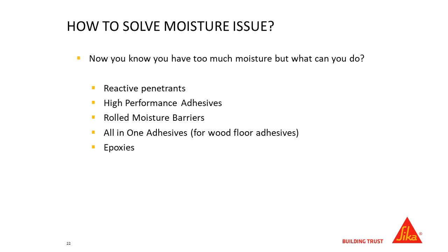Well, typically, if it's early on in the schedule, you're not due in for a number of weeks, the general contractor may tell you, okay, well, I don't need you for another 3 weeks. Let's just let the slab be, let it continue to off-gas, and let's wait until we get a little bit closer to the install date, and we'll decide what we want to do.